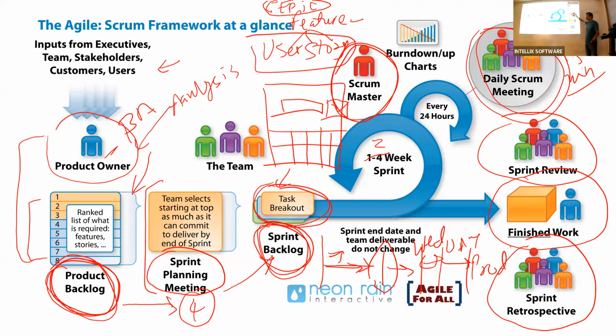Now, when they actually see the software, they might say, oh, maybe we could have done it this way instead of this way. So that's why an Agile project does not have end dates. Waterfall is, we have to deliver within 6 months, this project. Agile can keep on going for years. Sometimes that's what happens in companies, because users just keep changing their minds, and the project keeps going, and they keep putting more money into it. That's the drawback of Agile.